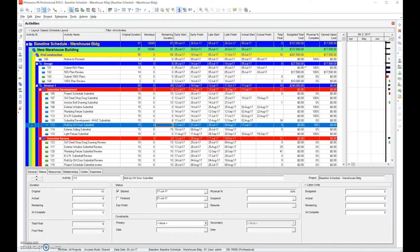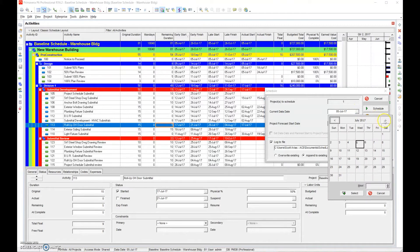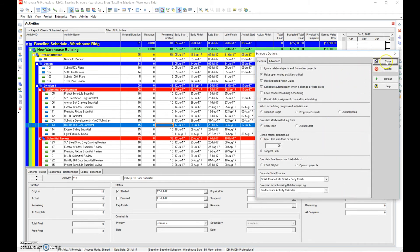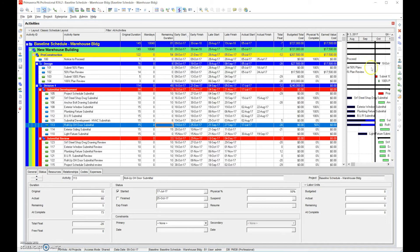Once we've entered all the actual starts, actual finishes, and percent completes, we're going to hit Calculate to calculate our new schedule with the new current date. Set the current date — say October 9th, the date we're reporting up to — go to Options, then hit Schedule. What happens is activities that haven't been completed are pushed out beyond October using the logic in the schedule. It reschedules the project using the actual logic. You can see the percent completes and the activities pushed out — the project has been rescheduled.